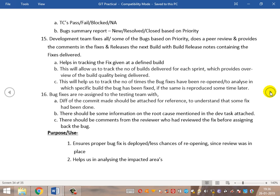Once there are no major breakages and the sprint delivery date is approaching or at risk of depletion, the product owner takes a proper decision to ensure no major break cases will be available in this release. The product owner prioritizes the bugs, sets up a call, and asks the dev team to fix all bugs in P1 and P2 priority. Any P4 bugs that are left out are moved to the next sprint.